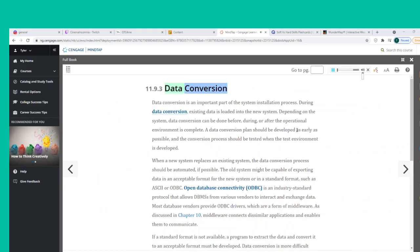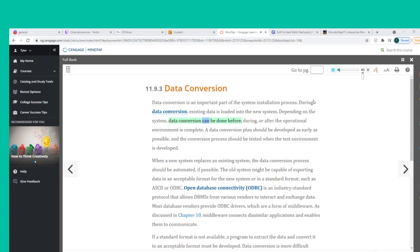Data conversion is an important part of the system installation process. During data conversion, existing data is loaded into the new system. Depending on the system, data conversion can be done before, during, or after the operational environment is complete. A data conversion plan should be developed as early as possible, and the conversion process should be tested when the test environment is developed.